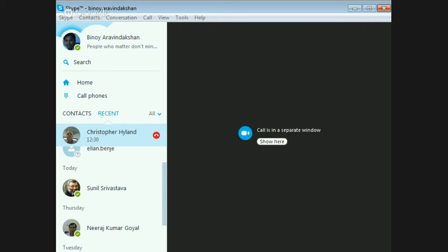And then the contract is actually measured against that. So in this case, you can see a little red curve coming up here. That's where we are at the point of this presentation, and the contractor believes they're about 2.57% ahead of their schedule. So that is how all of that is measured in terms of what is called earned value of the cost of the work.